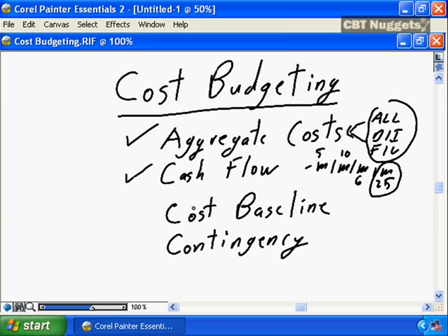Once you have the full cost budget in place, you need to develop a cost baseline. Here is the baseline against which all future measurement for my project will be done. When the project is approved and signed off, the cost baseline is $75,000 or whatever the case is going to be. That is the baseline, that is the measurement, that is the expectation that senior management and the business have for your project. Your project will be considered on budget if your project delivers at $75,000.